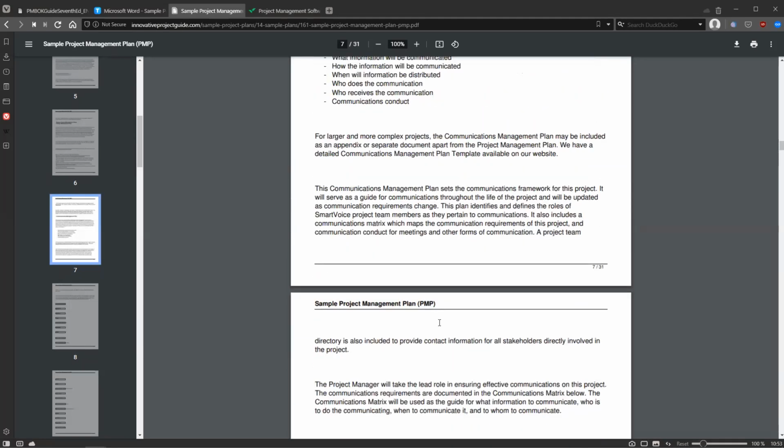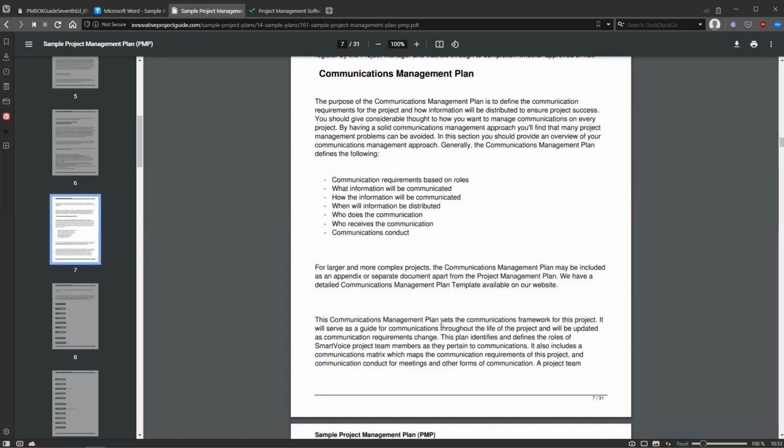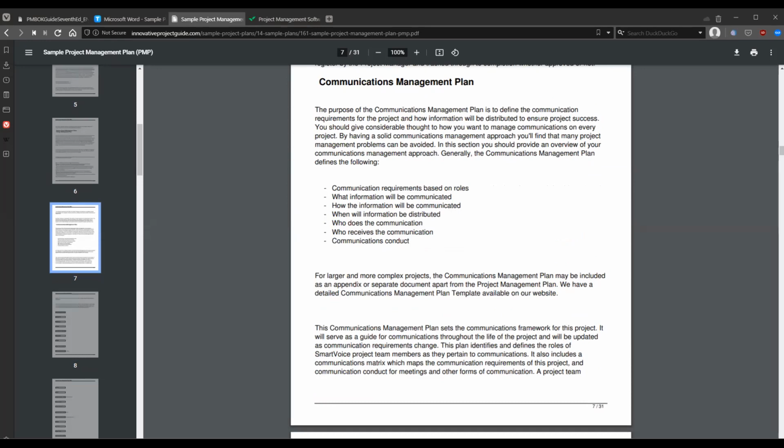So going back to communication plan and around stakeholder management, essentially you need to identify everybody who's impacting the project, and this list will continue growing. So to properly populate the list of stakeholders and everybody who's impacting the project, it's good to identify key stakeholders and people you think have an idea who can be impacting the project, and have, let's say, a one-on-one interview to talk about who they think might impact the project. I mean, that's one way to do it.